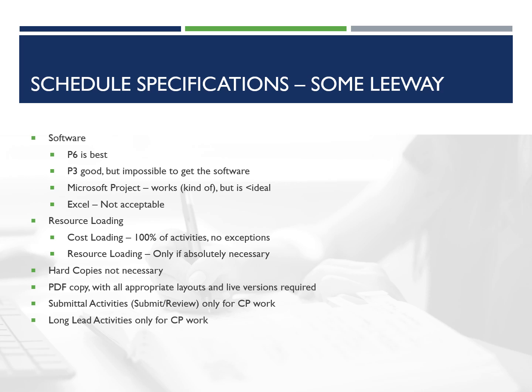Submittal activities, I only require submittal activities in the schedule if it's going to be a critical path item. You know, long lead activities for critical path work, definitely got to get those in there. Submittals connect to long lead, so I want to make sure that we're keeping track of those things that we think might impact the project completion date.